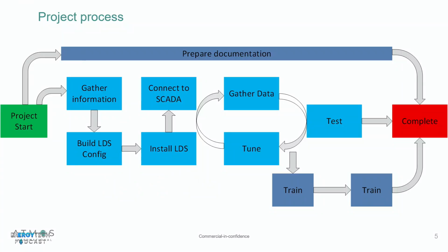When I was earlier in my career, before I moved to the US, we did a lot of projects where they hadn't built the pipeline yet. So what happened was we got in these first phases of the diagram where we're gathering information, mostly writing documents. And you end up doing 8 revisions of a functional design specification and 8 revisions of the initial LDS config. And then when you get the as-built drawings, the pipeline's completely different. So that can cause a lot of problems.